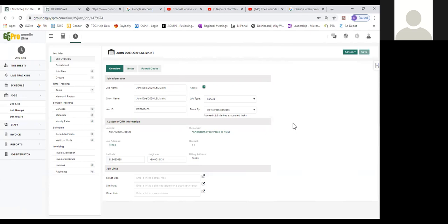And the way we were able to see it was that we actually had the information that we had asked for. The crew is communicating back to us. It's not for job costing purposes. However, if I know that I didn't spend more money on the mulch than what I budgeted, and I know that I didn't lay more mulch down than what I budgeted, then I'm probably looking at a job that's a win, especially if my guys finish the job on time and on schedule.